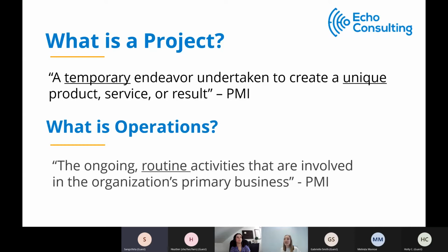There can be operations activities that are temporary but repeat. For example, if you're a part of a marketing organization, you might do batching of scheduling and posting social media posts. Some might think of that as a project, but because it's something that is routinely done month after month, even though it's only a temporary part of the week or the month, that really is an operational activity in nature. Comparatively, if you're rolling out a new software or solution to manage your scheduling of social media posts, with the result of hoping to have more streamlined processes, then that would be an example of a project.